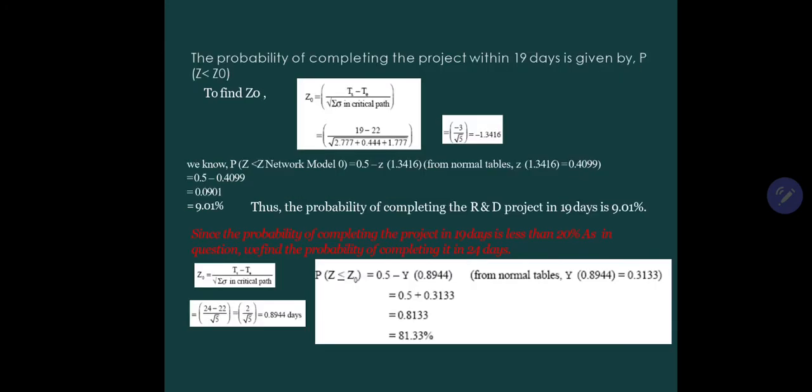It is a trial and error. Probability of completing the project within 19 days. Our critical path is 22 days, but if we want to complete it in 19 days, what is our probability? We can calculate by this formula: T minus TE divided by under root of summation of sigma in critical path. We have taken the critical path variances: 2.77, 0.44, 1.77. 19 minus 22 equals minus 3, divided by root 5, that is minus 1.3416. From the normal table, we calculate the value of Z of 1.346, which comes to 0.4099. We calculate 0.5 minus 0.4099, which comes to 9.01 percent.